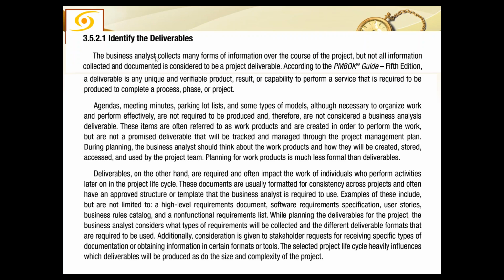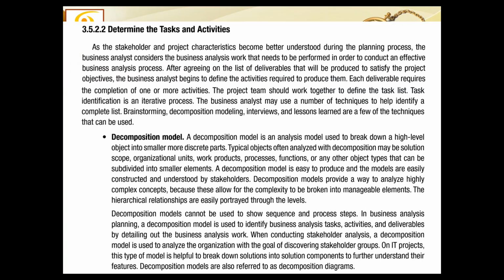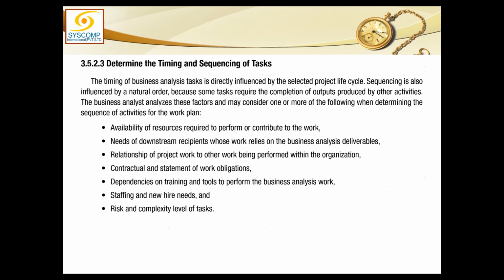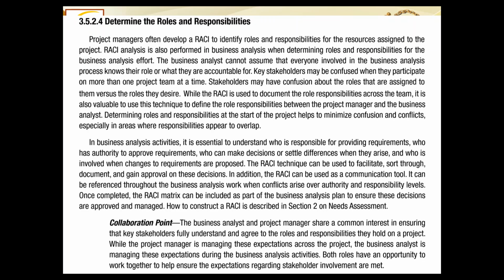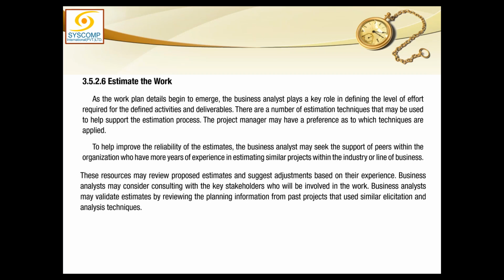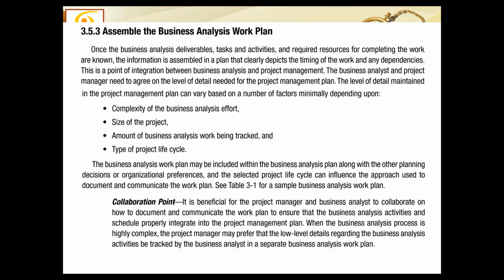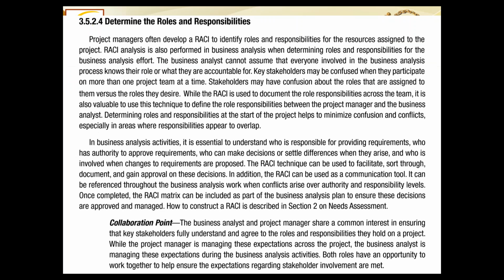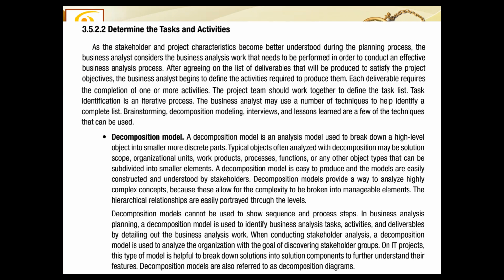First, you identify the deliverables, like we did the activity identification there. Then you determine the tasks and activities. Then determine the timing and sequence. Then determine the roles and responsibilities, identify the resources, estimate the work, and ultimately this would be the business analysis work plan. So let us take it one by one.